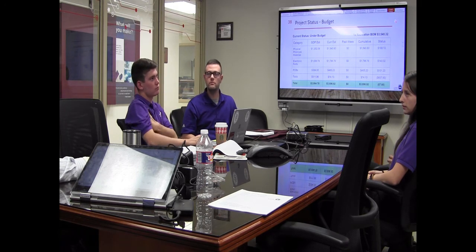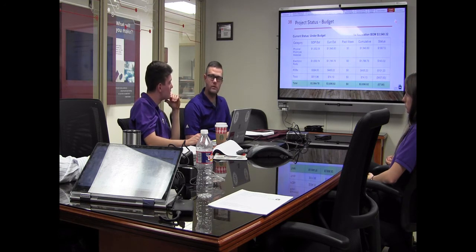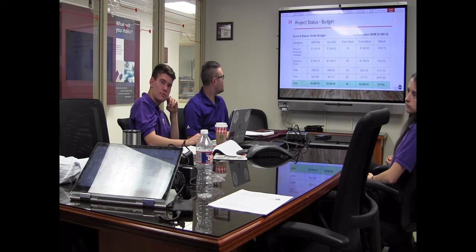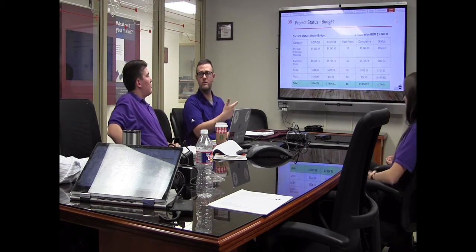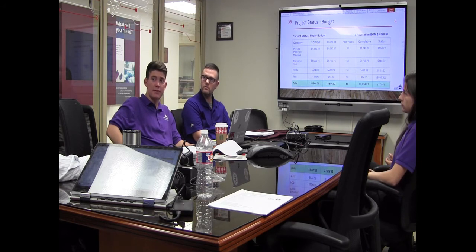What is the cost driver in that $3,500? Physical prototype materials, the cost of the wood. You've got an air conditioner that was about $500, one of the biggest expense items. With the routers and volumes, we might be able to get the electronics and PCBs down some. We used some premium items like all-metal gear servos so they don't wear out, which was a little more expensive. But by single item cost, it was the air conditioner, no doubt, about a 7th of the total.